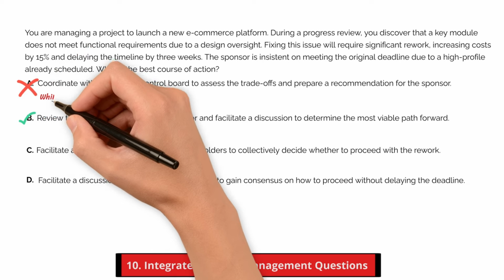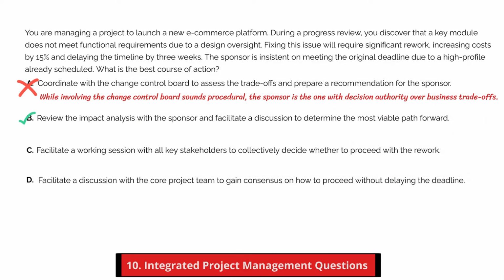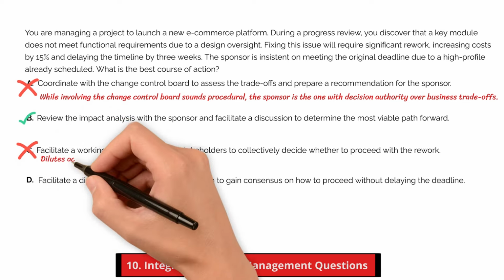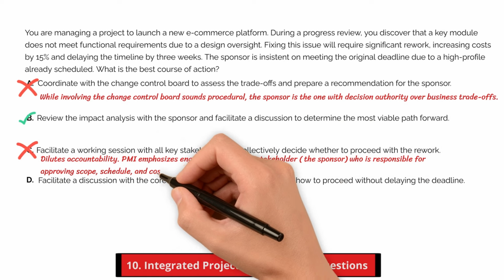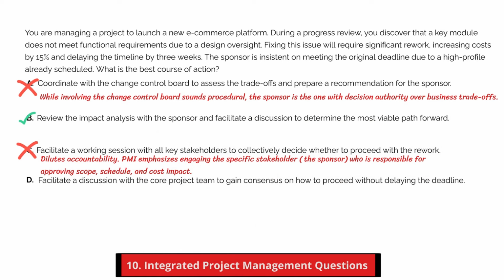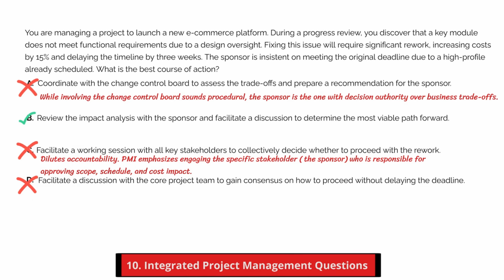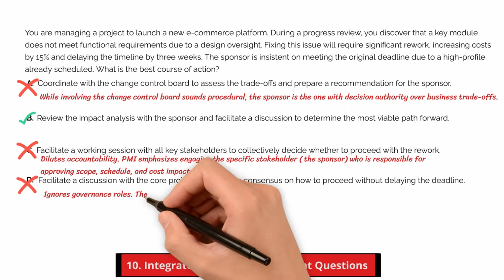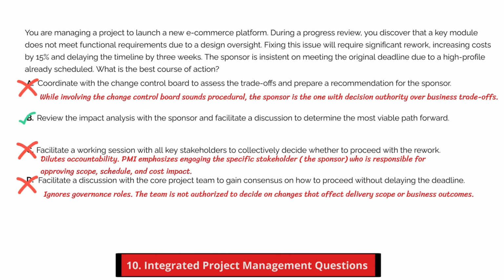Choice A is incorrect. While involving the Change Control Board sounds procedural, the sponsor is the one with decision authority over business trade-offs. PMI expects the project manager to go directly to the sponsor in this case. Choice C is incorrect. This distributes the decision-making across multiple stakeholders, which dilutes accountability. PMI emphasizes engaging the specific stakeholder, here the sponsor, who is responsible for approving scope, schedule, and cost impacts, not treating it as a group decision. Choice D is incorrect. While facilitation is good leadership practice, seeking consensus only within the project team ignores governance roles. The team is not authorized to decide on changes that affect delivery scope or business outcomes.